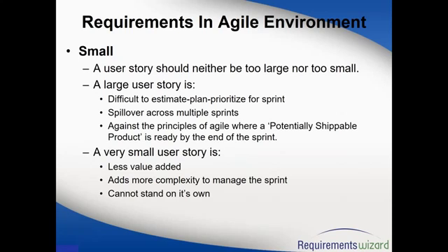The reason is if it's a big story, it is difficult to estimate. People cannot estimate. If I tell you to estimate the entire system, that's difficult. But if I tell you to estimate how much time it will take to create one form on the screen, it's much easier. Correct. If I tell you to estimate how much time it will take to build this website, as compared to how much time it will take to build this form which has 8 fields in it, the second option is much clearer because I know the scope of the work. I can plan it. I can estimate it.